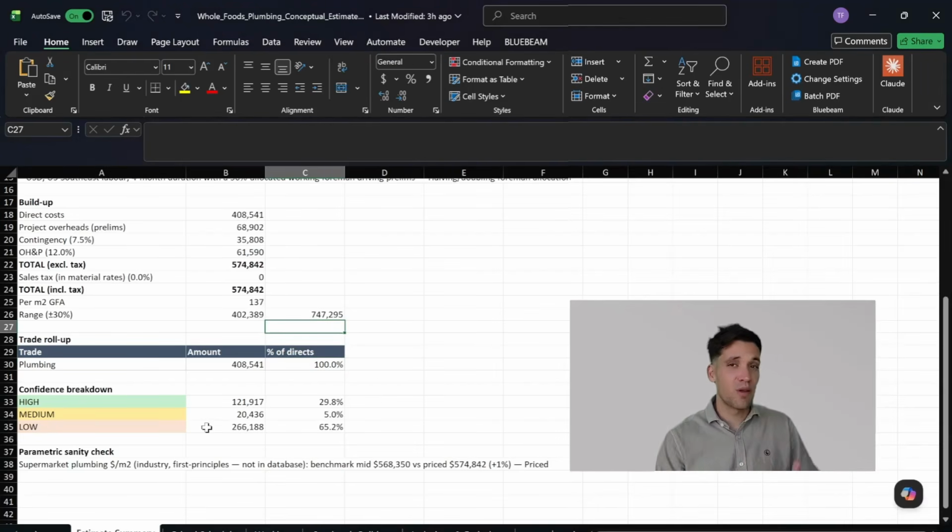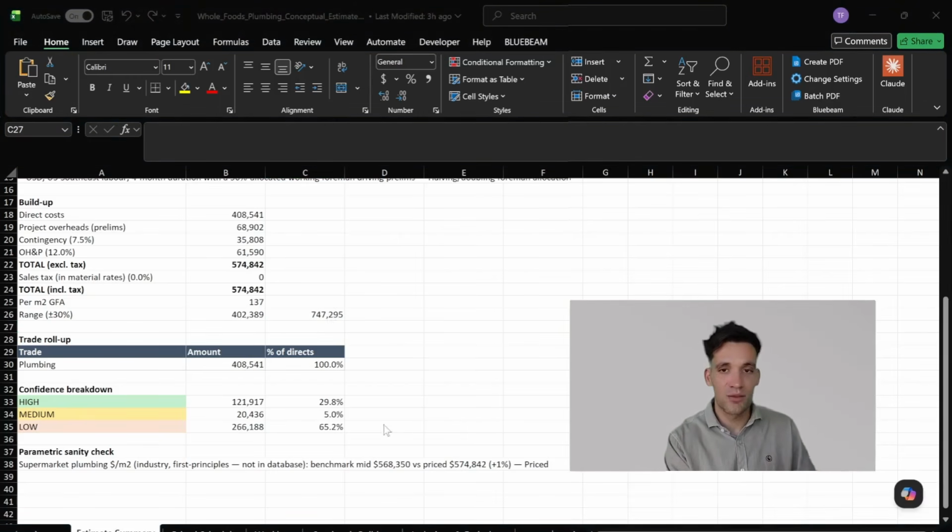So again, where I would say you should use this workflow is if you want a quick budget price, maybe before you prepare a detailed estimate, whether you're just preparing a high level dollar figure to provide to your client and it's a bid to bid situation where they haven't yet secured the contract, there's a loose scope of works and you don't want to put a lot of time into pricing it because you're not going to be held to the price you prepare. Or if you're a developer and you want to do a quick feasibility study.